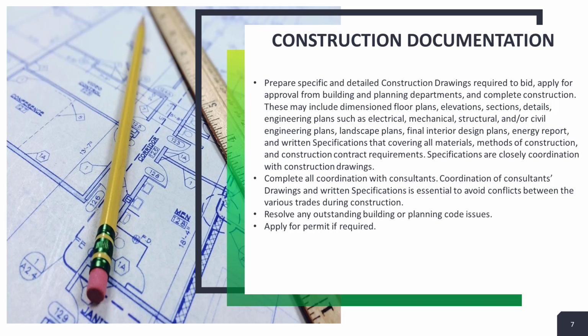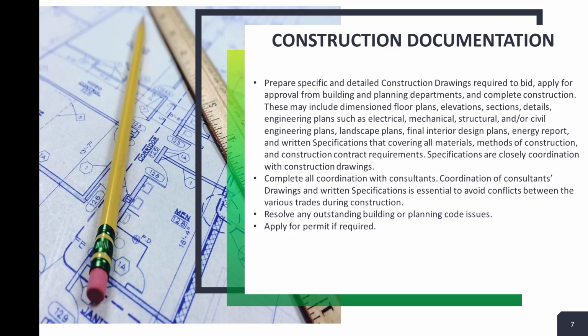One thing we try to do is we try to make any changes to the documents prior to it bidding. Any time after the bidding has taken place and a change is made, it is going to cost more. That is just the nature of the business. So we try to resolve any issues prior to that. Again, in most cases we are not going to have any change orders in the construction administration phase, but we try to get those taken care of prior to that.